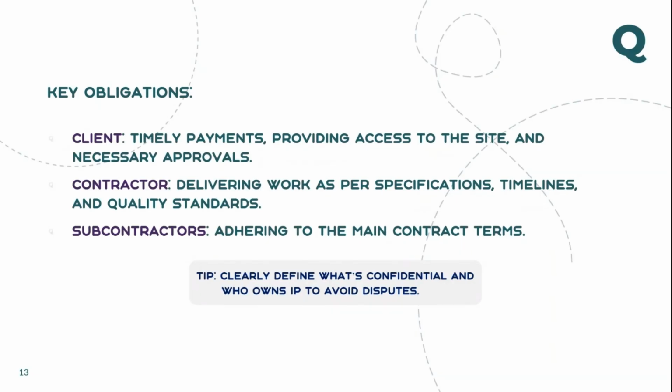If you're a contractor, your eyes should search for those points where the client's obligations are clearly stated. If not, what are you going to do? Let's see only three points: you look into timely payment, access to site, and permits, approvals and work front. Next, you have to look at the risk part of it. Okay, the obligations are written there, I'm very happy. What if those obligations are not met? What would I do? I cannot just stand and watch. Do I have a remedy for that?